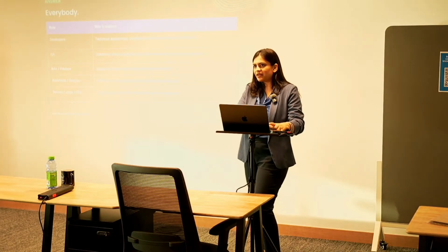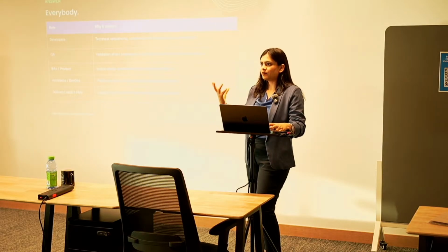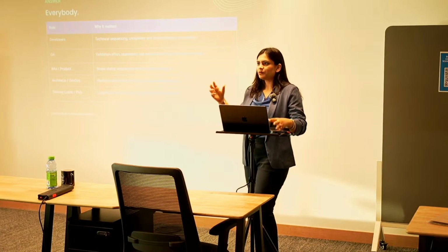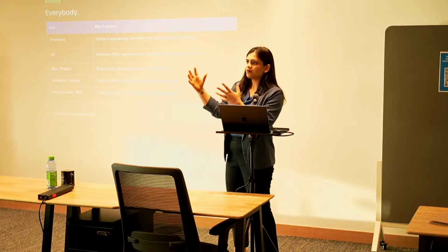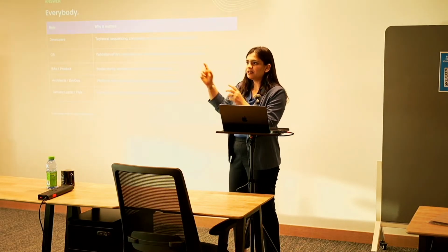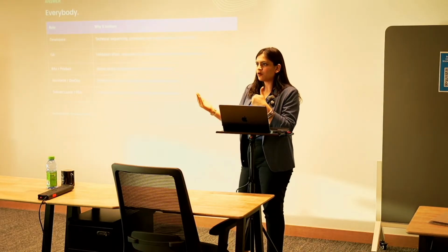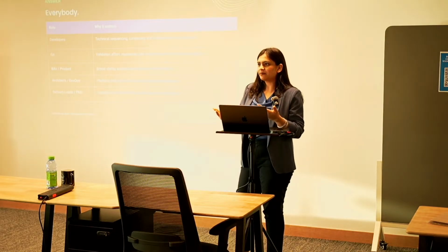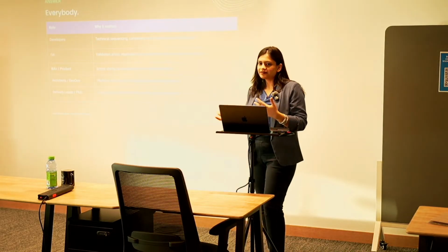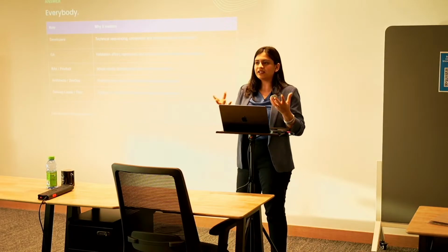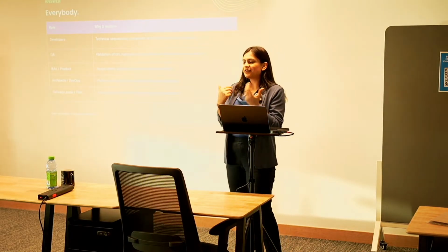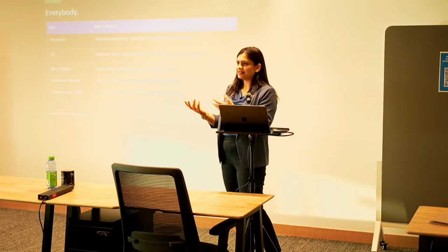In my experience, if it's going to be a product that is festive, that appeals to a lot of the masses, then I'll potentially try to release an MVP which has the checkout and payment end to end, rather than a subscription model, which might be important to me in the off season when the product isn't selling much, right? So yes, there are decisions that we need to factor in, and prioritization is an exercise which happens together with the product owners and our clients.